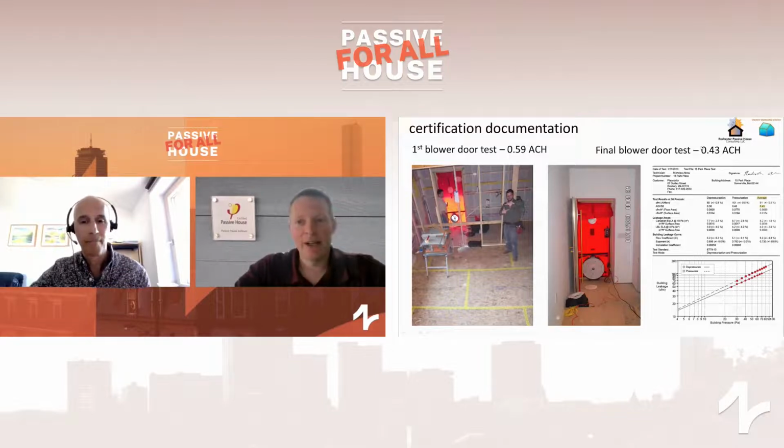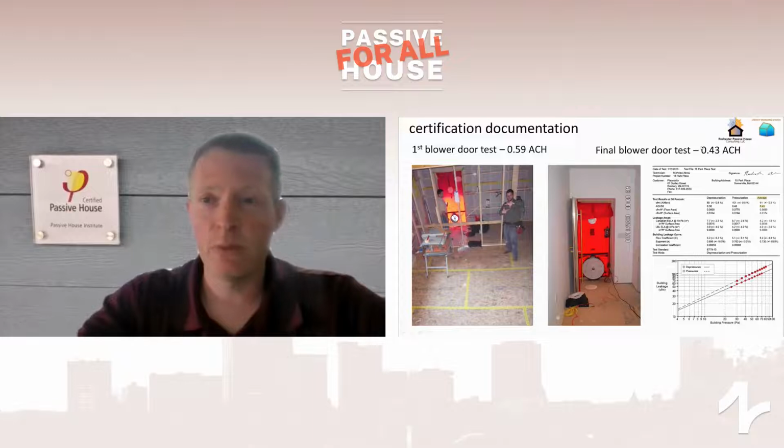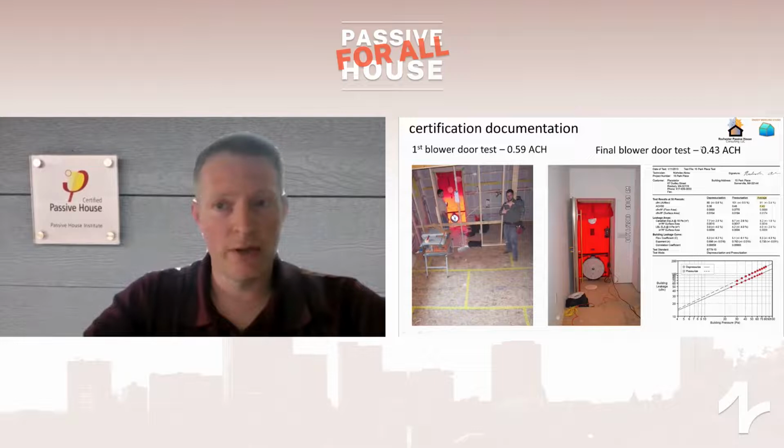Yeah, you're absolutely right, and that would have been the first thing that would have thrown up a flag for me: okay, you did the blower door test 7-8 years ago at this point. Was the VN50 correct? And you've said obviously that it wasn't. It's great that they were still able to provide that information. In the link that I already put in the chat, there are sample documents for everybody to take a look at, and one of them is what they're looking for in a blower door test report. So I would certainly recommend, if you've never done a pressurization and a depressurization test, to take a look at that report as to what is required on it.